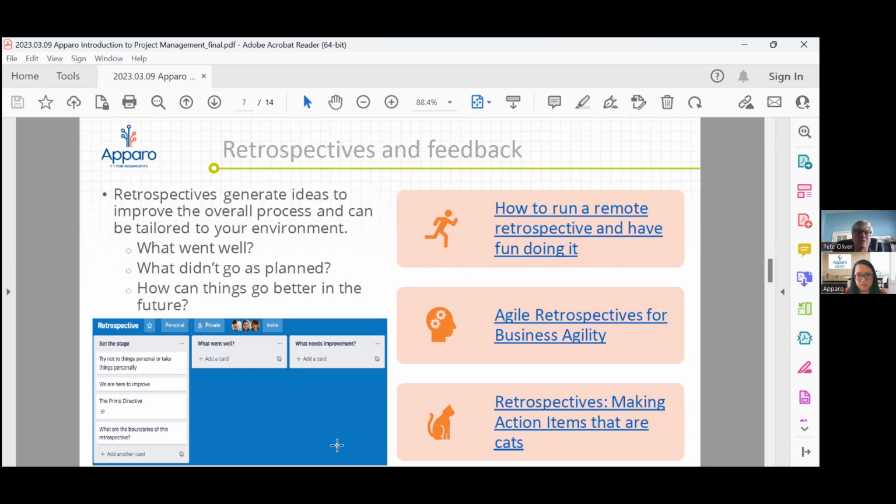Well, what might actually be the problem is that those keywords actually came from, I'll call it a subcontractor that was doing the work. And maybe they could have done it when they first put together the bid and the proposal. Oh, we could have provided you with them. Yenting was sitting there, waiting for them to provide that, and they just didn't know. So again, the focus is really on the process and how you can improve the process.